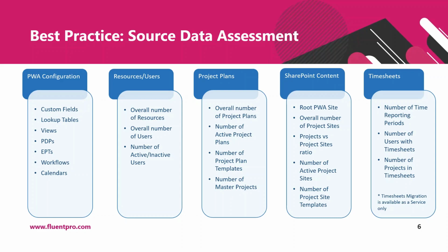In this case, you will need to use a workaround for migrating such templates and create a project site from a template in your source system, migrate the site to the Project Online PWA, and then save the site to a template.